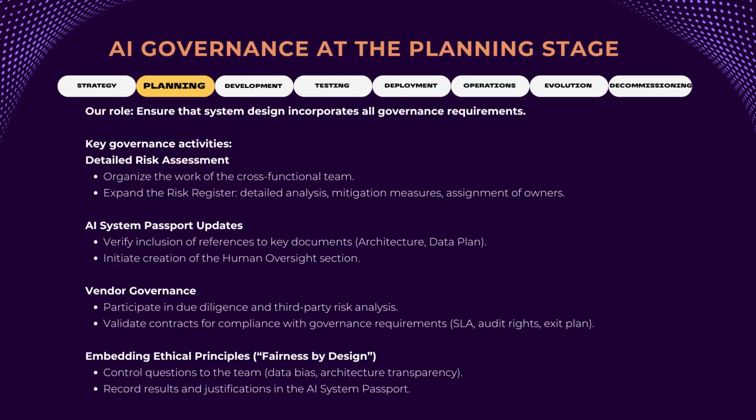Third, where external vendors or contractors are involved, we verify that selection criteria and contracts include audit rights, security and data protection requirements, allocation of responsibility, a safe exit procedure, and contingency plans. All related risks go straight into the third-party risks category of our risk register.